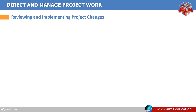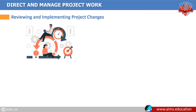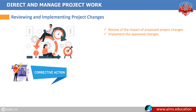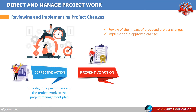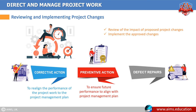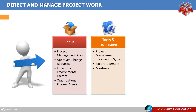Reviewing and implementing project changes: no matter how great the develop project management plan process was, it is natural to have requests, changes, and variances during the project lifecycle. The direct and manage project work process is used to review the impact of proposed project changes and implement the approved changes. For this purpose, the following actions are used — corrective action, which realigns the performance of the project work with the project management plan; preventive action, which ensures that future performance is aligned with the plan; and defect repair, an intentional activity to modify a non-conforming product or product component. Here are the inputs, tools and techniques, and outputs of this process.